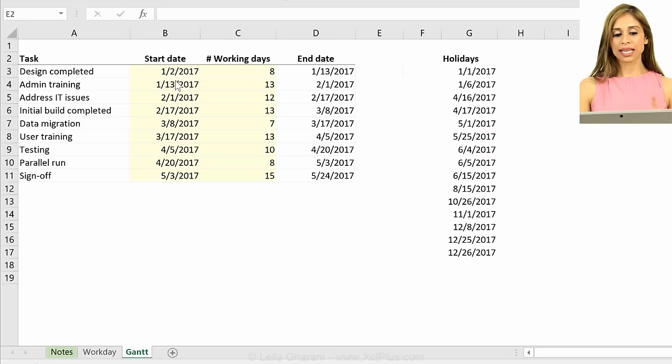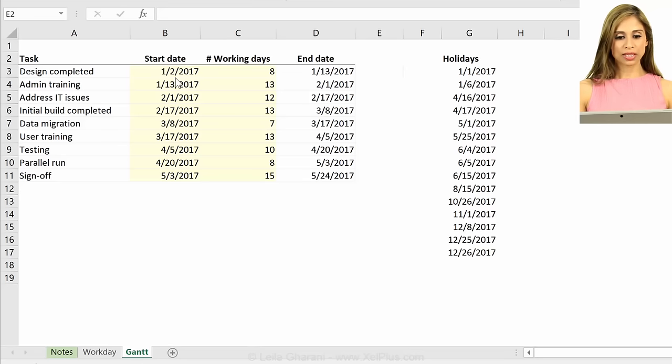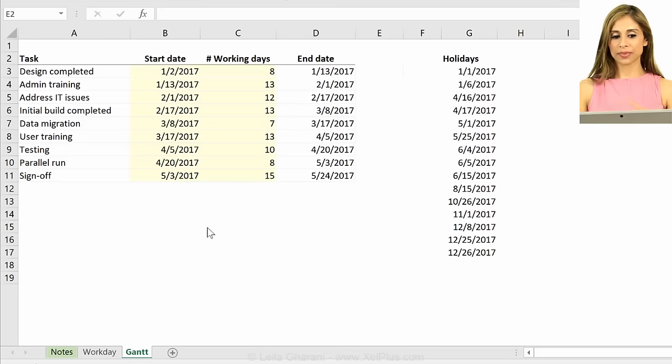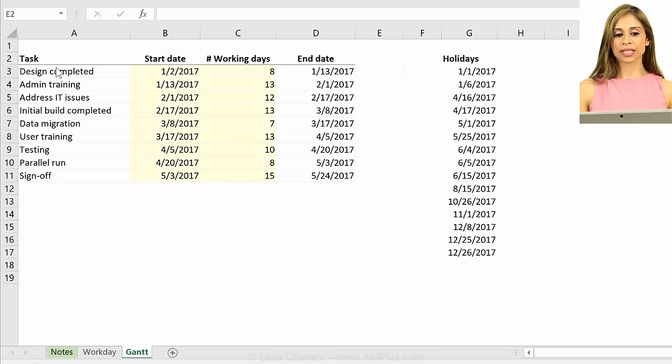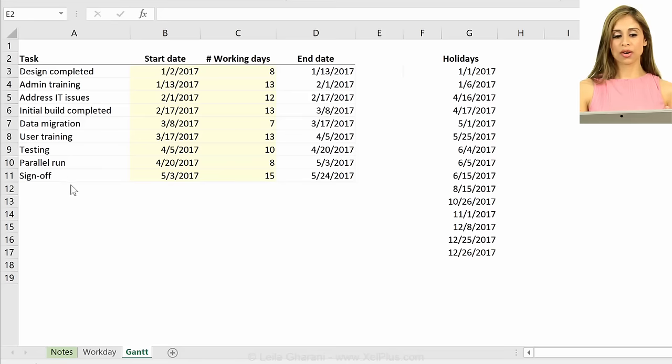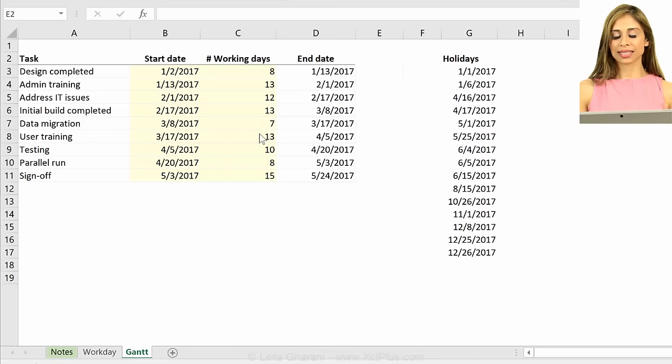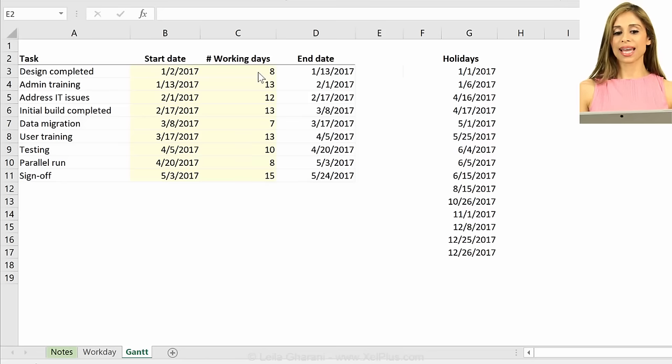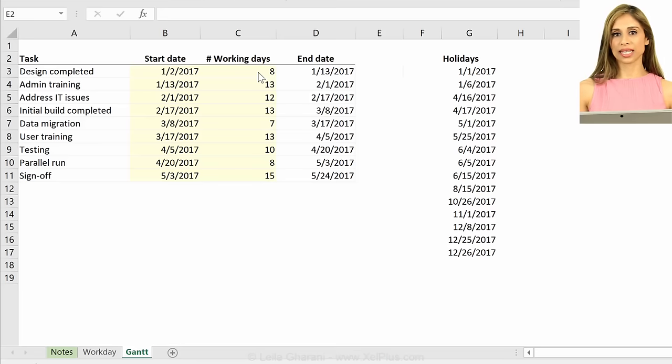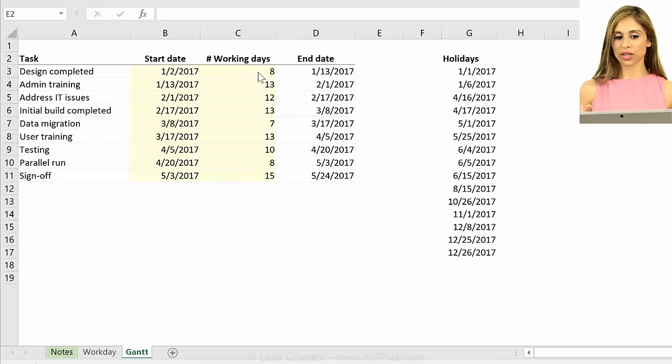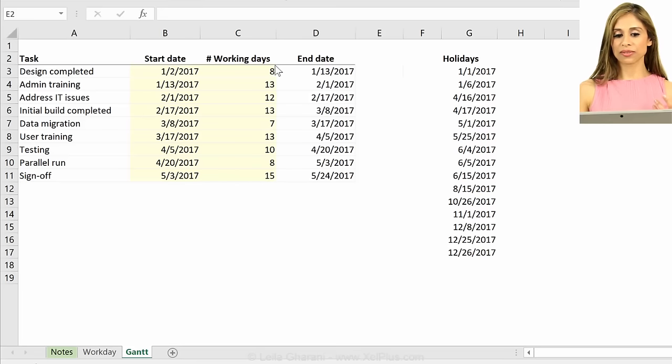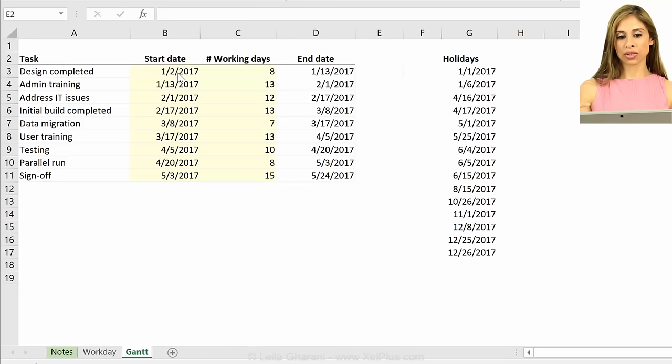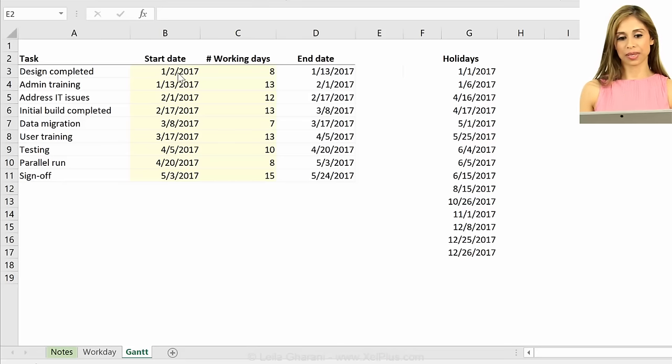My way of doing this for this lecture is to use an actual Excel chart for our Gantt chart. So let's think how we can do that. What I'm going to do is to use the start date. I want the start date on my x-axis. I do want my tasks on my y-axis. And these number of days, I actually don't need the number of working days. I need the number of full days, including weekends and including holidays. So basically the full difference between this and this, because that way I can visually see how long that task is going to take me.